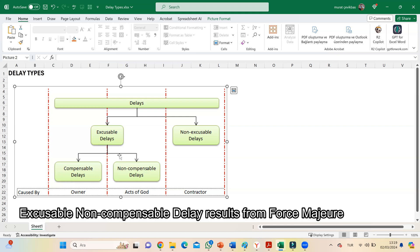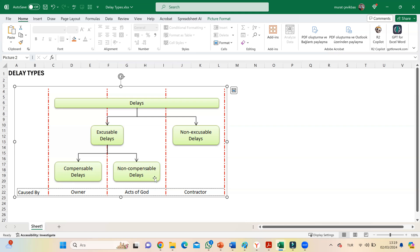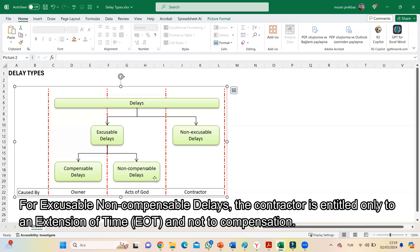Excusable non-compensable delay results from force majeure. For excusable non-compensable delays, the contractor is entitled only to extension of time and not to compensation.